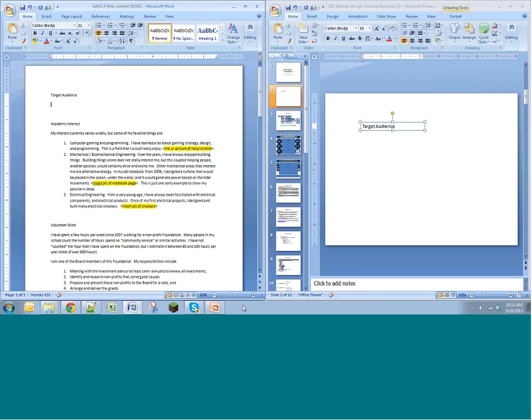If you don't do your planning properly, your development time is going to take 90+% of your time, because you're going to end up redoing it and you'll end up with a rat's nest. But if you take the time to define your target audience and your goals and your strategy, the development work will happen very, very, very quickly.